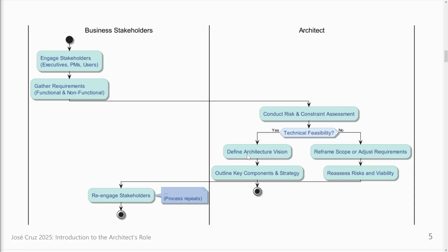I remember developing and discussing with other architects the architecture vision. Sometimes it's a document that says, this is the first version of our architecture. And usually, sometimes people call it a plateau. And then you have the second version. Okay, it will be like this, but we want our final architecture to be this third one, and this will be accomplished in a year and a half. In the first 6 months, we'll implement like this, and due to these things that we are introducing, we can then migrate to version 2 without breaking anything, and then on the third version, we'll do something like this.